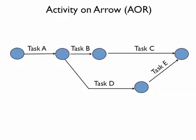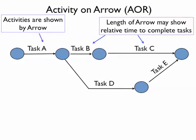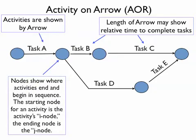Activity on arrow — the activities are actually represented by arrows. The length of the arrows may sometimes be used to indicate the relative amount of time needed to complete a given task. Nodes are where tasks intersect, providing information about precedence. A starting node is referred to as an I node and the ending node is a J node. For example, task A's J node is task B and D's I node.